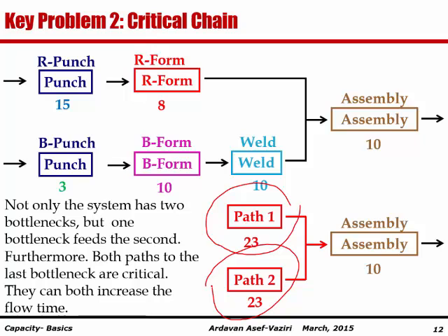We have a lecture this week. You watch it, and it shows us such a system when there are 2 passes with 23 minutes and 1 activity with 10 minutes. Such a network can never be completed in 33 minutes. It will take much more time than 33 minutes.